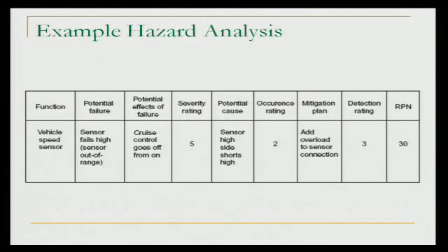But once you have all the data, you have to rank them. The risk priority number is one way of doing it. But then you have to have a discussion on what the mitigation plan is. How do you actually get around some of these? Some might be hardware fixes, some might be redundant nav systems, which is kind of hardware and software. Some might be purely software.